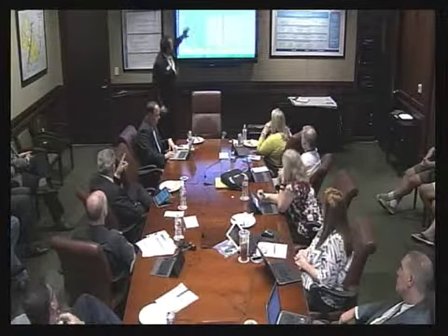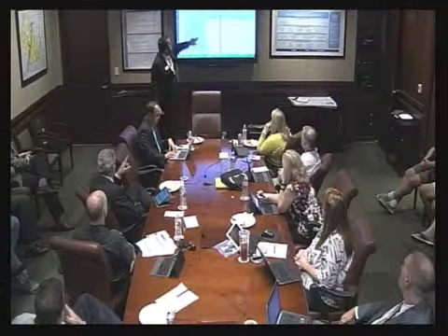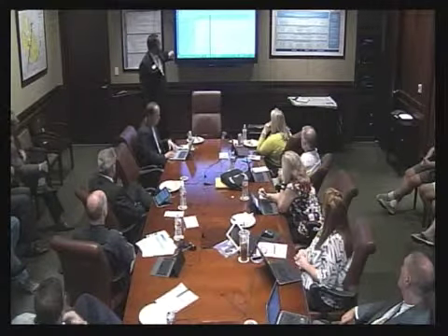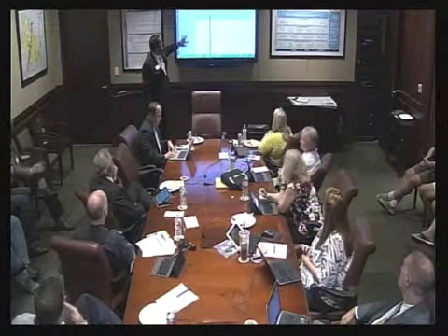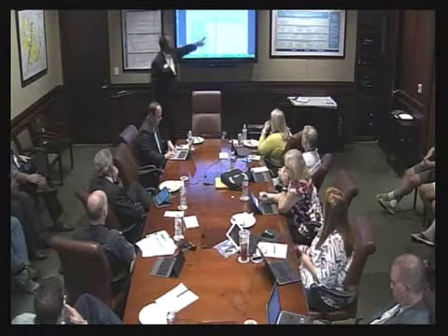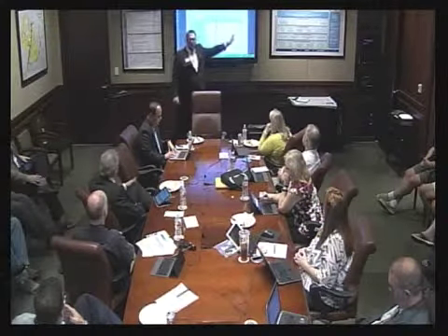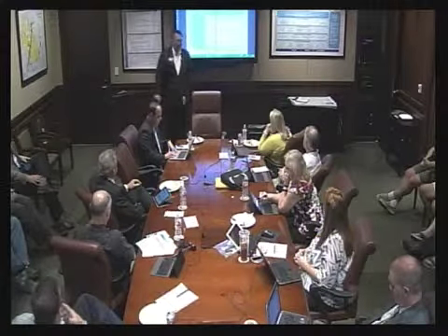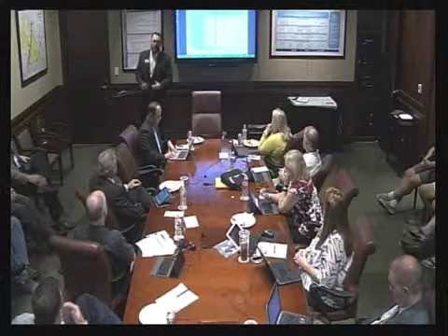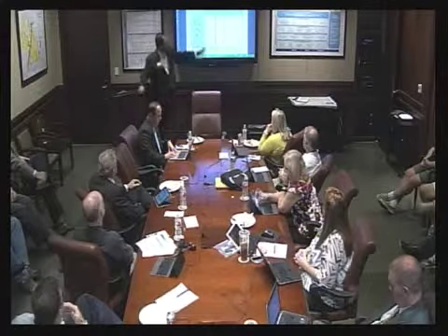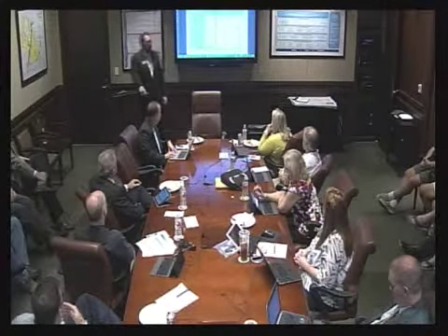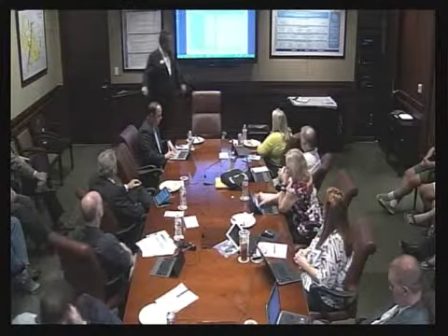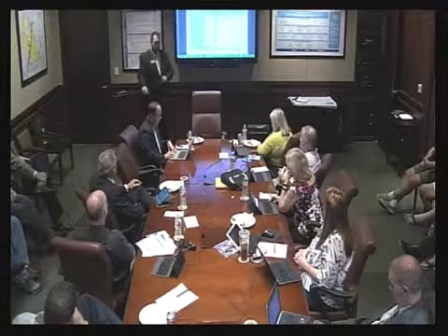Lane width being comparable to full depth. Correct. Because if you do the first column, you're doing almost 50% more lane width. That's a lot more material and drainage. Yeah, these are all 24-foot wide road sections, so it gives you a little bit better feel for the actual cost per square foot or per surface area of the improvement. This was actually based on a different street bid for that first column. Again, this was produced back in July 2014, so the numbers are slightly different based on the current estimates. Is that what you were looking for?